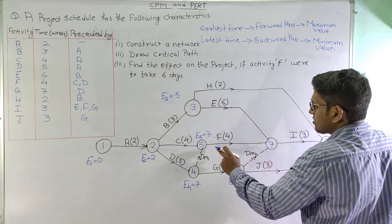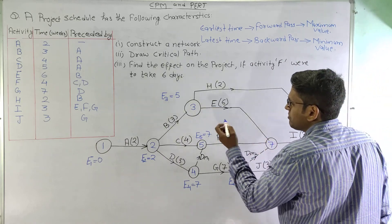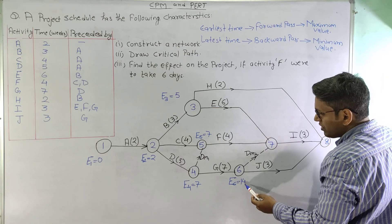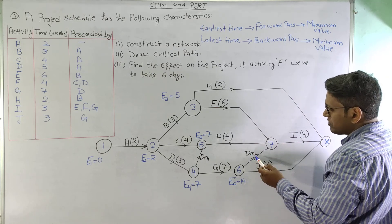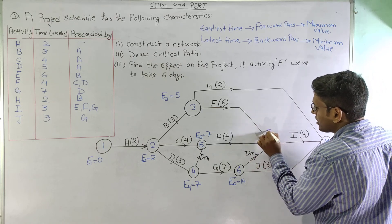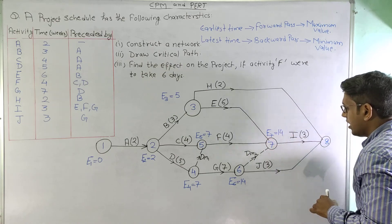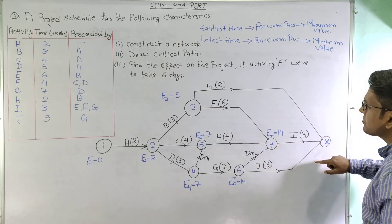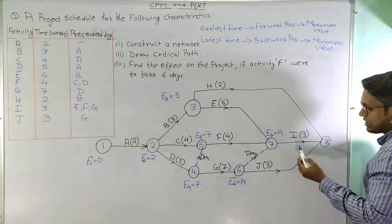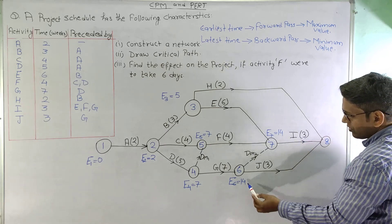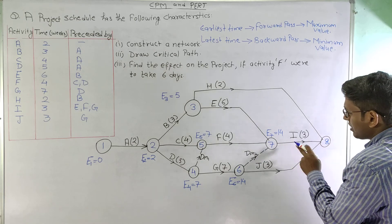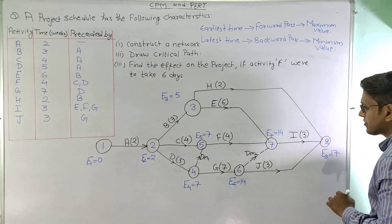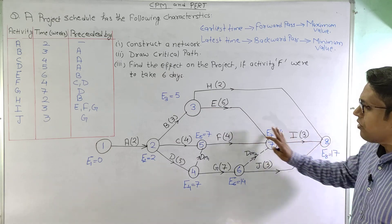At node 7, three arrows are coming in: 5 + 6 = 11, 7 + 4 = 11, and 14 + 0 (dummy) = 14. We select the maximum value, so E7 = 14. At the final node 8, three activities come in: 5 + 2 = 7, 14 + 3 = 17, and 14 + 3 = 17. The maximum value is 17, so E8 = 17 weeks.